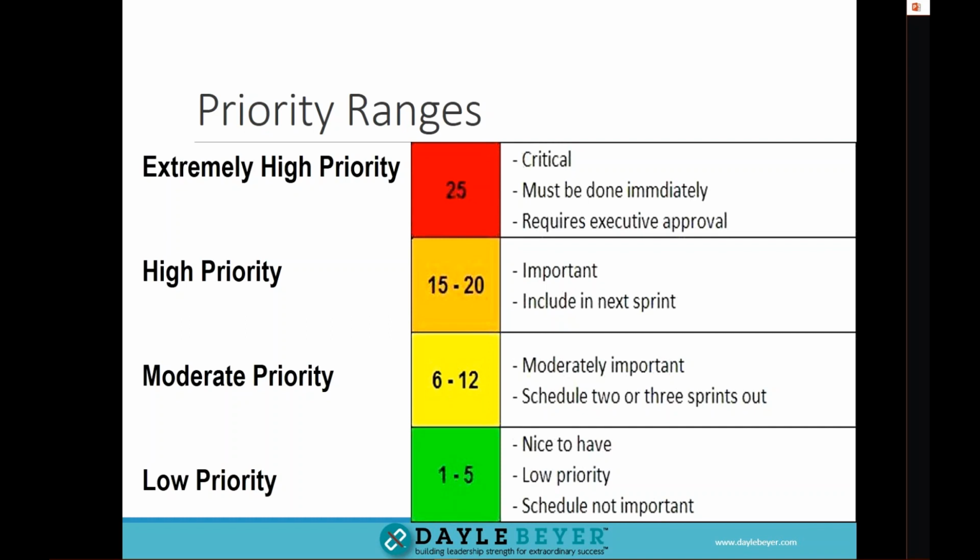When you prioritize a story, you do a quick assessment of the urgency and business value, and then you simply multiply the two numbers together. Then using a highlighter, you can color code the priority number according to this chart. That's it. It takes 10 to 20 seconds to do this for your user stories.